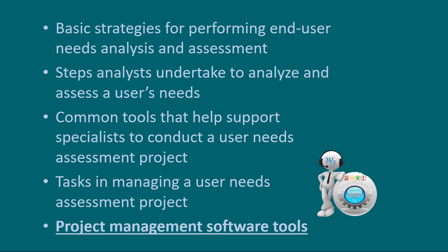This just involves ongoing assessment of project tasks to determine how much work has been accomplished so far, how much work still remains to be done, and how changes in the task will impact project completion dates. Adding more staff to a task or a project doesn't necessarily get it done faster or even better.